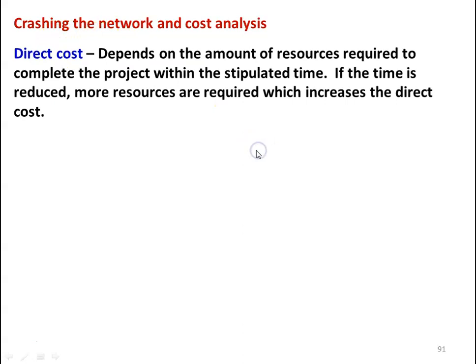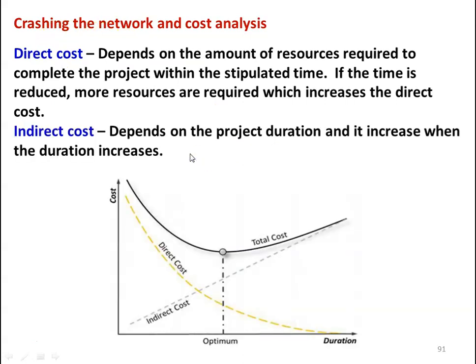Crashing the Network and Cost Analysis. For any project, cost and time are involved. Resources directly involve cost. There are two types of cost in project analysis: direct cost and indirect cost. The direct cost depends on the amount of resources required to complete the project within the stipulated time. If the time is reduced, more resources are required, which increases the direct cost. The resources may be men, machine, or material. When you reduce the time required for completion of the project work by crashing, the amount of resources required will increase, causing an increase in direct cost.